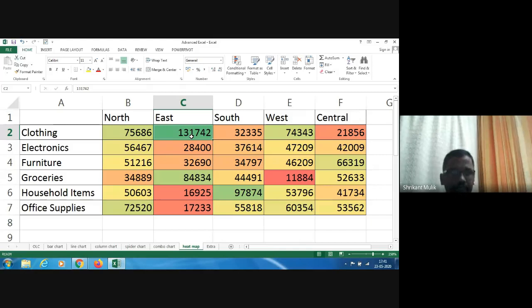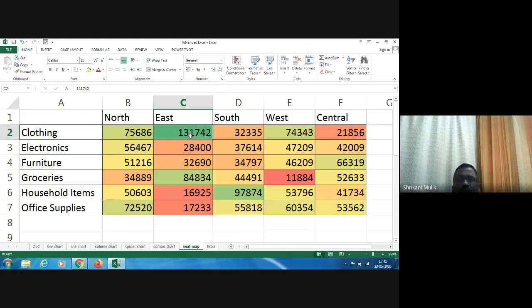You can generally use red, amber, green, or red, yellow, green. We call it RAG. It is typical and has a convention. As I said, red is something which is danger, right, and green is something which is prosperity, something good. So you should use colors with those conventions. If you use otherwise, people may get confused. So though there are possibilities of different colors and you could choose any color, I would suggest that you follow these conventions very much: red is danger, green is prosperity, and yellow is something which is not good, not bad, kind of a thing.